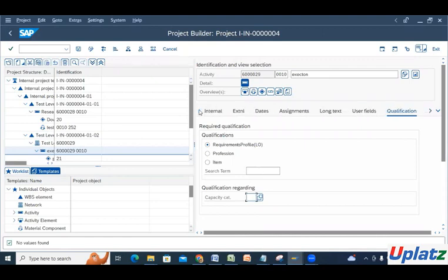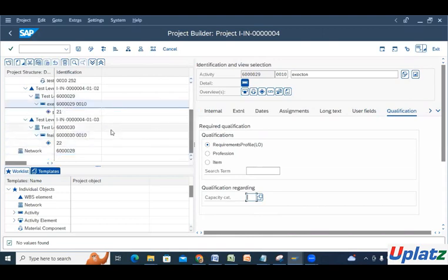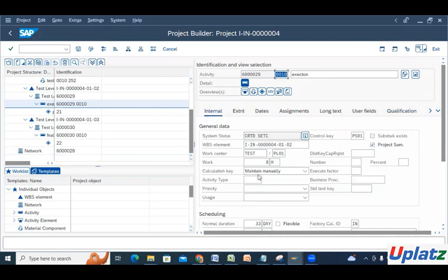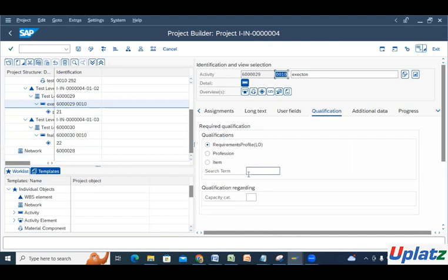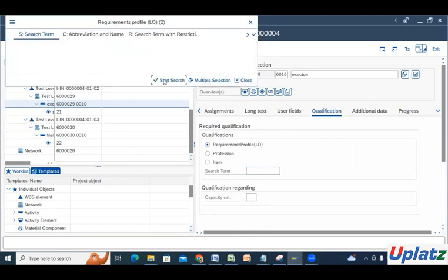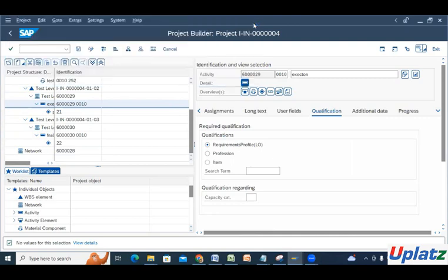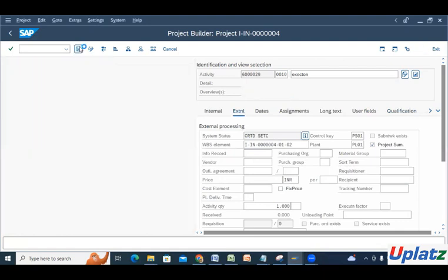That way you can create a project team member, and against that project team member you can maintain the project workforce planning based on their qualifications and professions. This particular assignment is not added because we have not created those qualifications as a capacity; these things will be created by another person, in another module. This is also no value found. Once this is done, we will be able to create the assignment of any employee or worker. This way we can do the workforce planning against that scheduling.